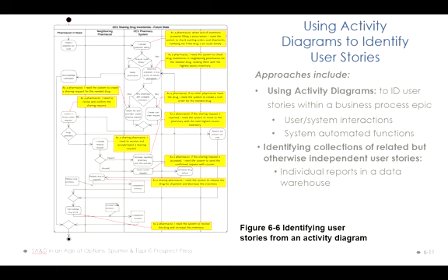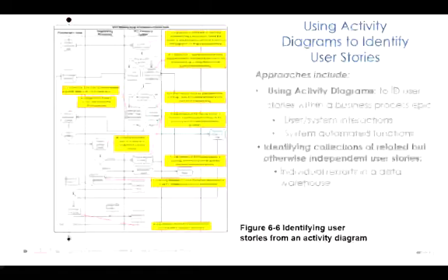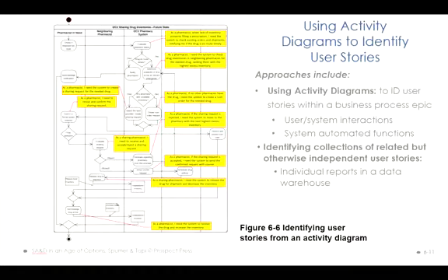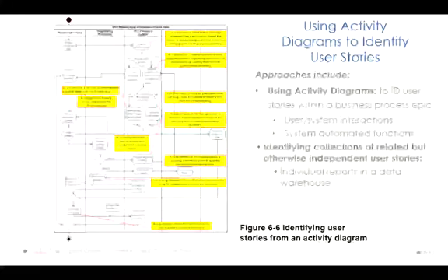And the user story, again, will be the single unit that you assign as a job or requirement. And typically it involves, again, a programmer's 1 day's work or 1 week's work. You assign this piece of program to the programmer. He or she can complete that in a week. For example, you will not assign a program to write a point of sale system in a week or in a day, but you may ask your programmer to write a function that calculates the total when the user scans the product and you read the barcode and calculate the total and generate a receipt.